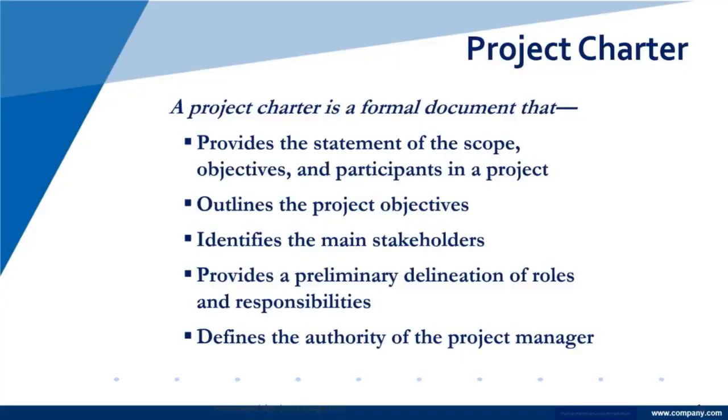But the idea here is there's a lot that can be part of this, and part of it is the authority that the project manager actually has. And it is part of the charter that gives the authority to the project manager. And it can be crippling for projects when project managers don't have full authority or don't have enough authority to direct work, to spend money, to do whatever, because that's what a project is about.